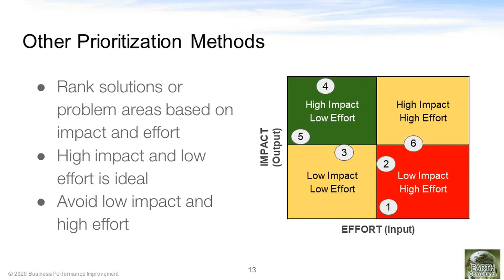Previously we also mentioned the impact and effort matrix, which can be used if you don't want to go through this level of detail with your prioritization. You can simply identify the different projects and put them into four buckets based on how much impact they may have and how much effort it might take. We're looking for projects in the upper left corner that have high impact and a low amount of effort, and trying to avoid the ones with low impact and a high amount of effort.